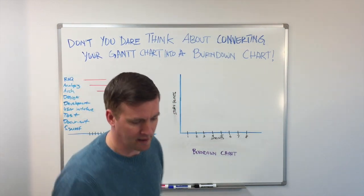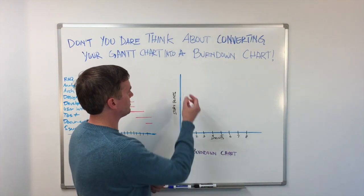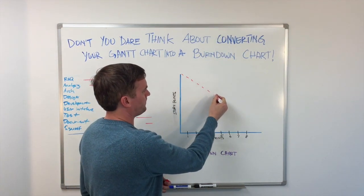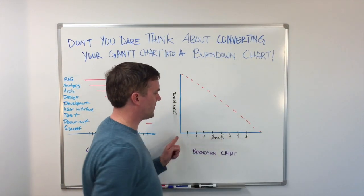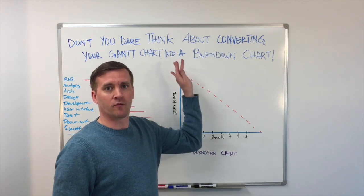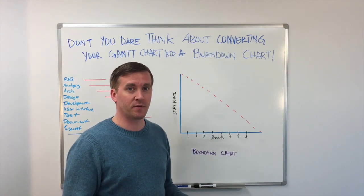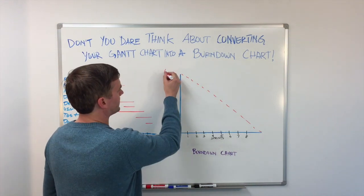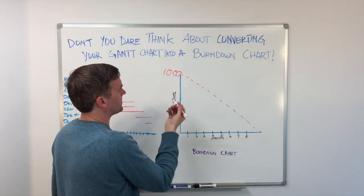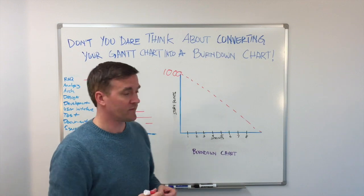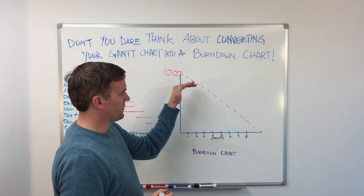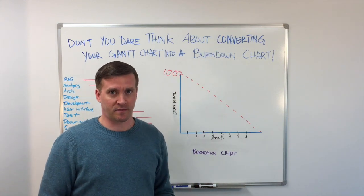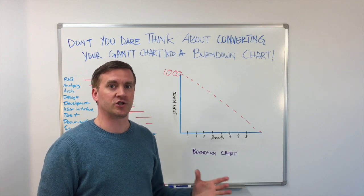Now over here we have a burndown chart. The way burndown charts work is over a certain amount of sprints, we have a certain amount of work that we would like to have finished. Typically that amount of work is measured in units of story points, but it's not completely uncommon to use hours. The difference is, sprint over sprint, you're going to complete a certain amount of work that is going to be at a potentially shippable state.